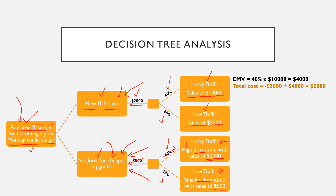To calculate EMV for buying a new IT server with heavy traffic: there is a 40% chance of making $10,000, which gives an expected value of $4,000. The total cost is minus $2,000 (cost of the new server) plus $4,000 (expected sales), giving a net EMV of $2,000 for the heavy traffic scenario.